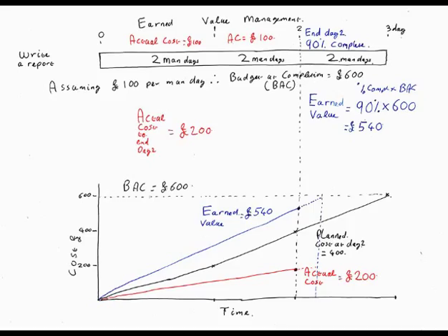And then, what else? It enables you to produce forecasts. Yeah, but that relies on the numbers, doesn't it? Yes, you have to do the formulae to calculate the CPI and the SPI. But it does allow you to extrapolate the curves to see where they're going to end up. Yes. It allows you to do measures of where you are today. So you can calculate performance measures for today. It gives you a systematic way of doing that. Okay, that's an advantage, is it? Yes.